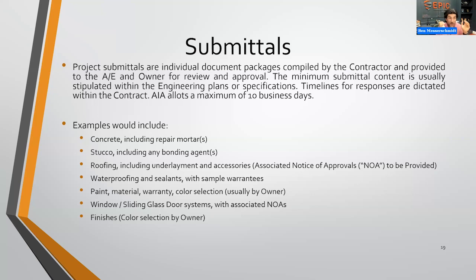Obviously, you're going to be paying a premium for that approach. So in the design phase of everything, when you're meeting with your designer, understanding where you want to be in that spectrum, whether or not you want to have a 10-year product, a 5-year product, a 20-year product, if it's even possible, that's going to set the bounds as to what is available even on the warranty standpoint of things.